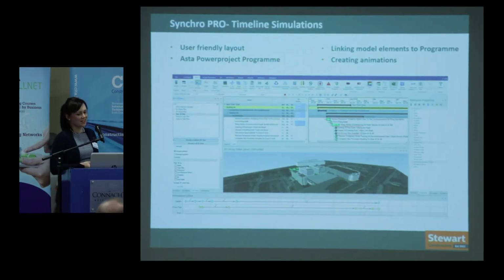And Synchro Pro. So basically, probably most of the people would be using Navisworks Manage to create simulations, but we got the Synchro Pro, which is like a, I think, higher level. So it's a user-friendly layout. You can bring your Asta Powerproject program, which we would receive from our planners, and bring in the models and then link everything together.